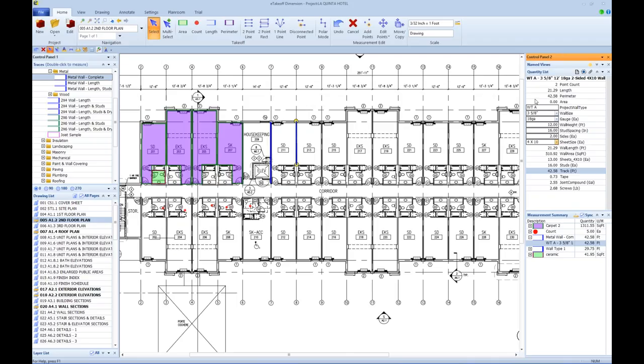This one, for example, actually saves itself as the name based on what you put in. So this is wall type A, 3 5/8 inch, 12 foot, 18 gauge, two-sided 4x10 wall. So that's really, really great, powerful features that are built into this program that allow you to get more done. So I got a lot of results here for one single measurement. And then I can use this over and over again